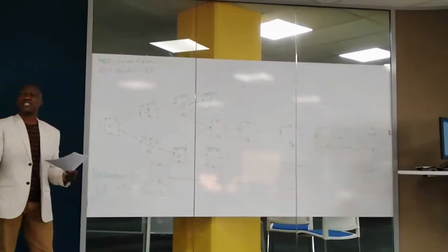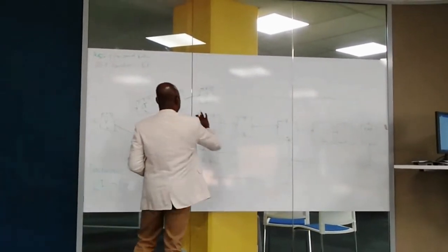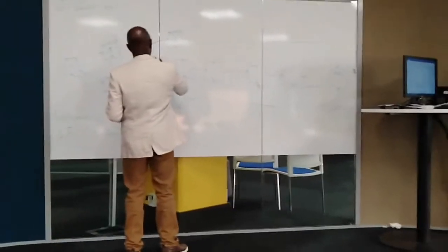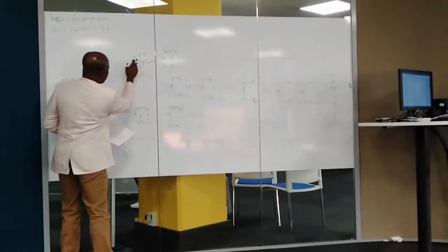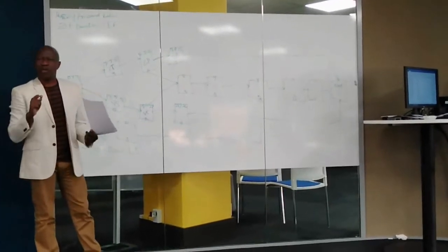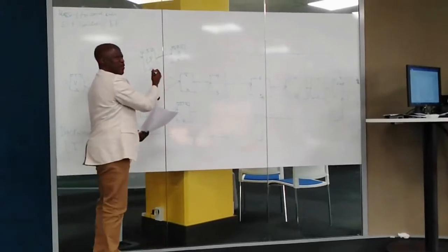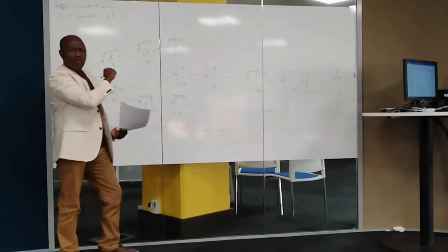Now we are going to activity 8. Where is activity 8? Activity 8 is dependent on 3 and 6. Yeah. Now this is a bit complicated, but it's common sense. When we're moving forward, we take in the highest number of days of the preceding activity. Get it right. When we're moving forward,